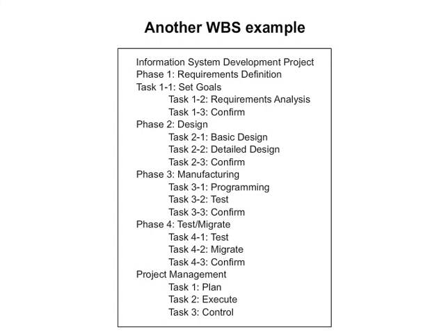We can provide even deeper details than shown in this figure, by breaking work down to the work package level. For example, the requirements analysis task for a system update project could be broken down further into individual work items such as analysis of the system's current state, interview research related to user requirements, interview management for managerial requests, analyze and finalize requirements, and confirm with stakeholders. These items can then be planned as individual work items.